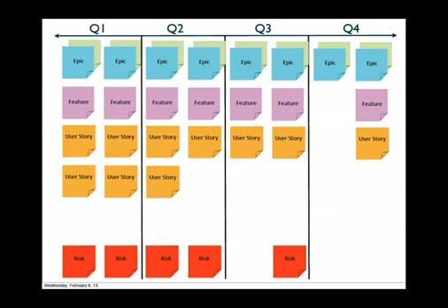So there was a willingness to bring in spikes to be able to deal with that, but we still had no notion if we could commit within the release to be able to deal with that. If we had had a longer-term product roadmap and we could have looked into quarter two or quarter three and said, hey, this idea of French localization is coming, we need to pull some things forward to mitigate the risk of being able to deliver that in a subsequent quarter.